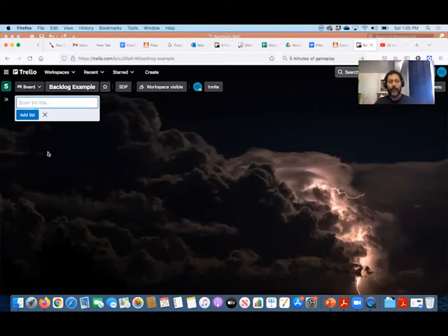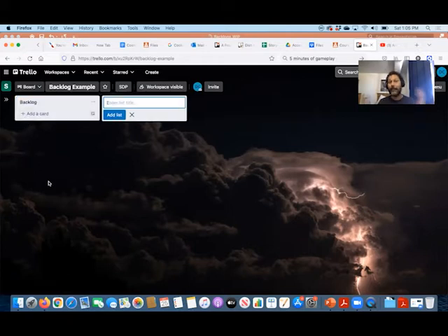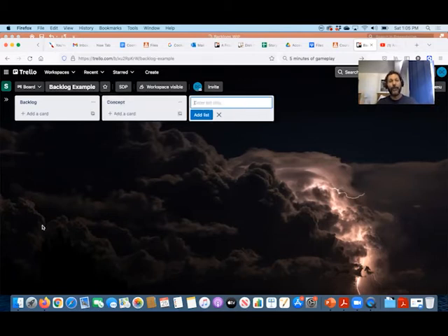So the first one is I'm going to write backlog right here. And this is a list of everything that needs to be done for the game or the project that you're doing. And I'm going to make a column called concepting. We could also call it prep or pre-production. I'm going to add in development, right? Let me add it right now. In development, add the list.